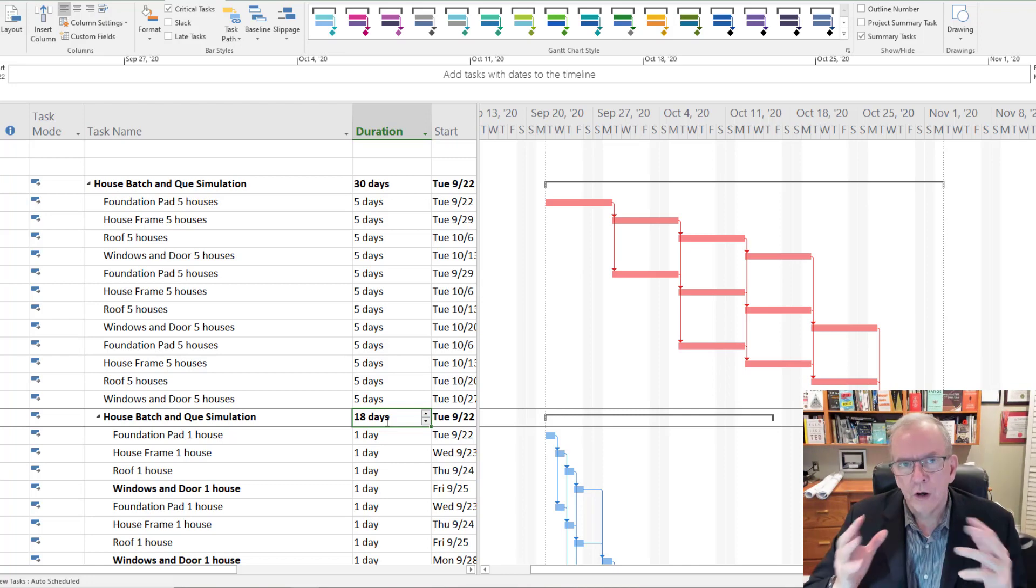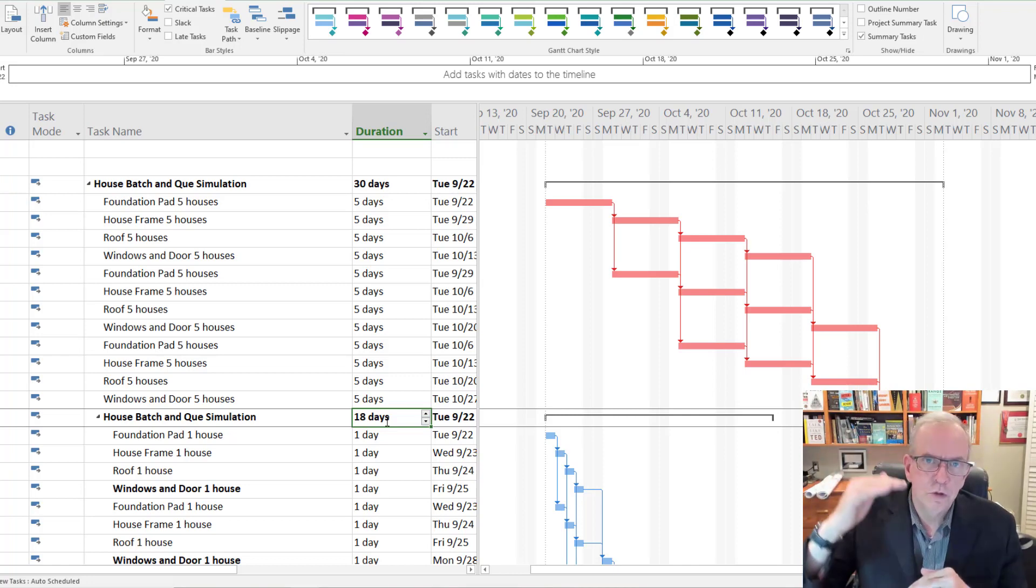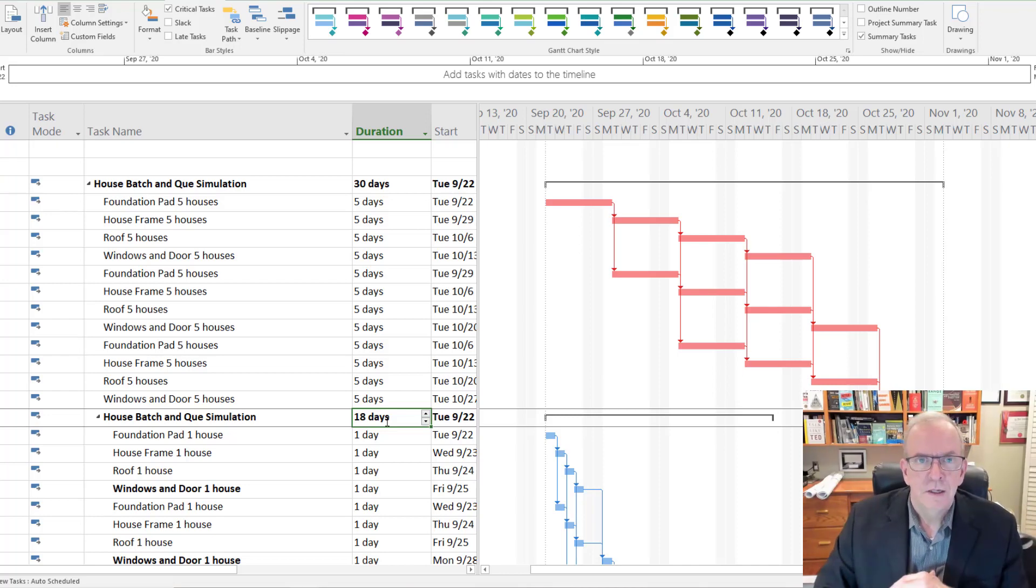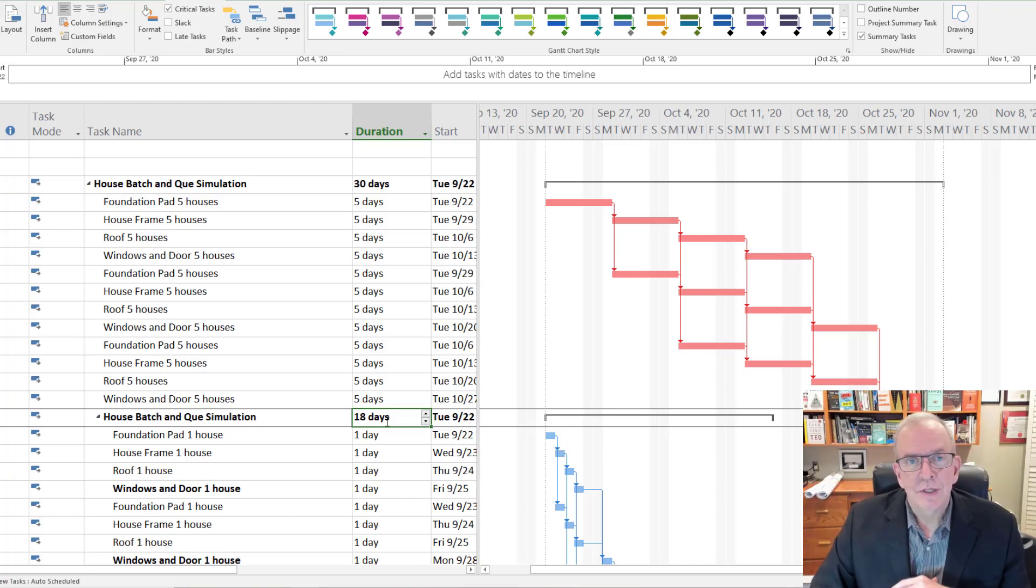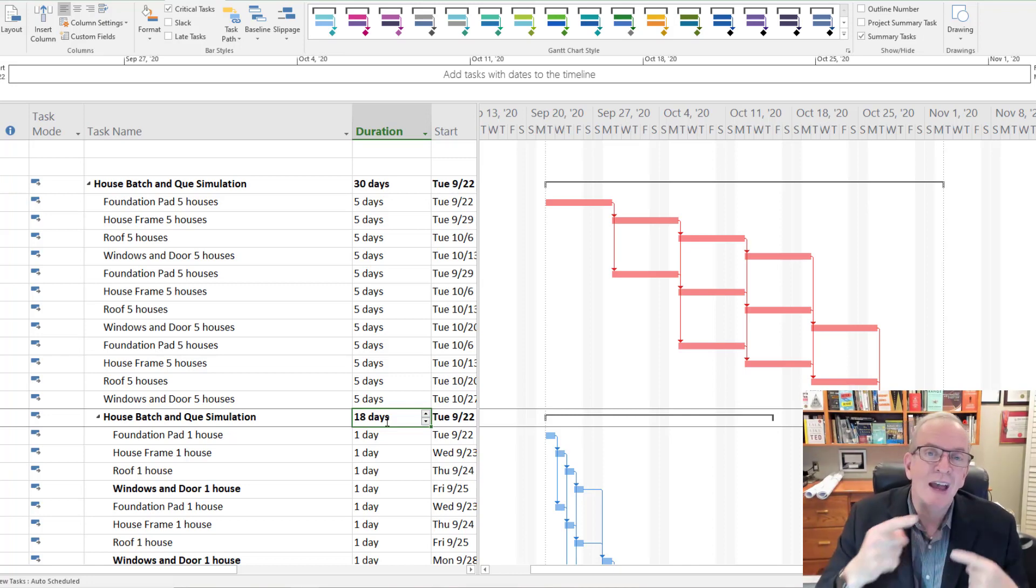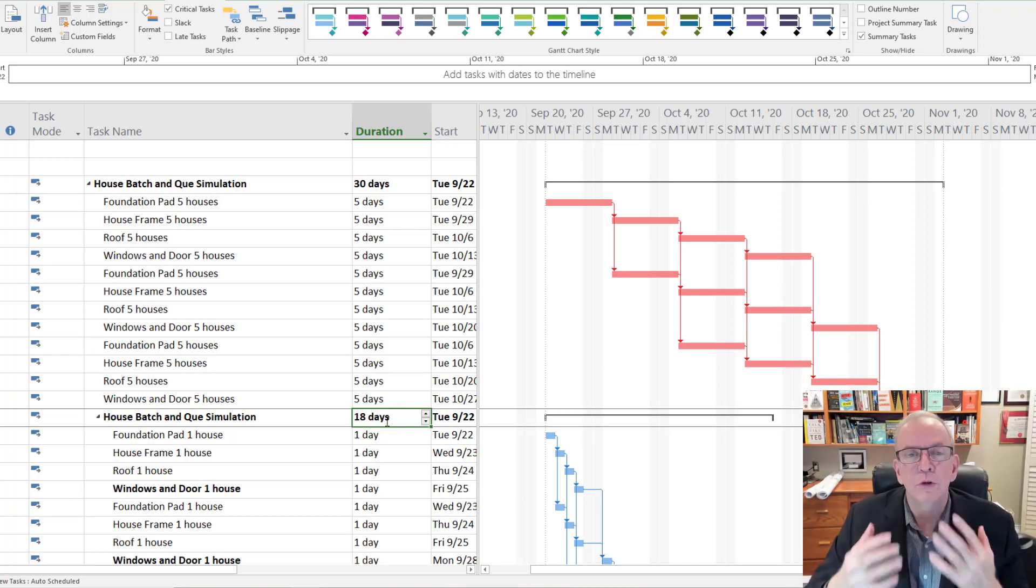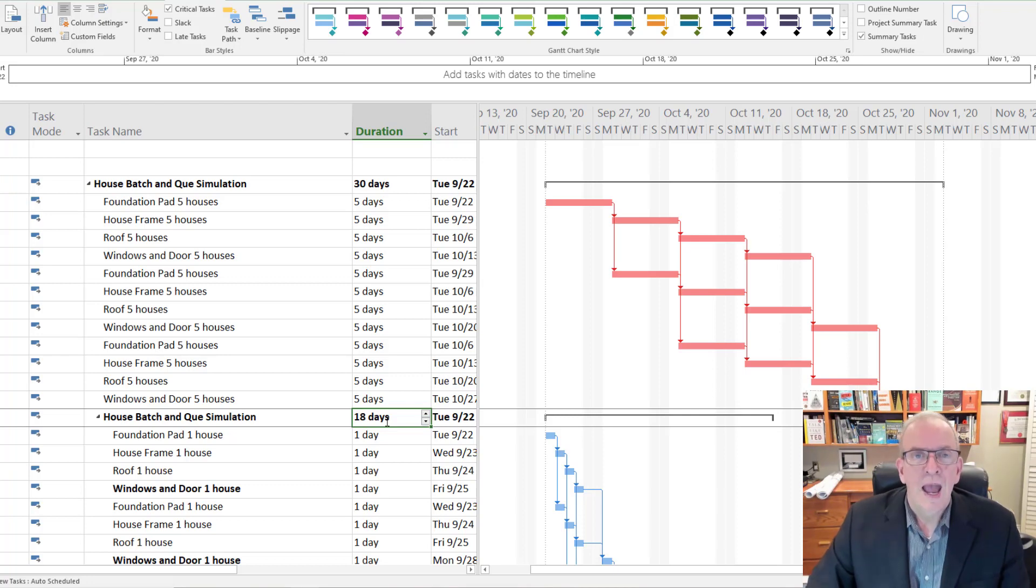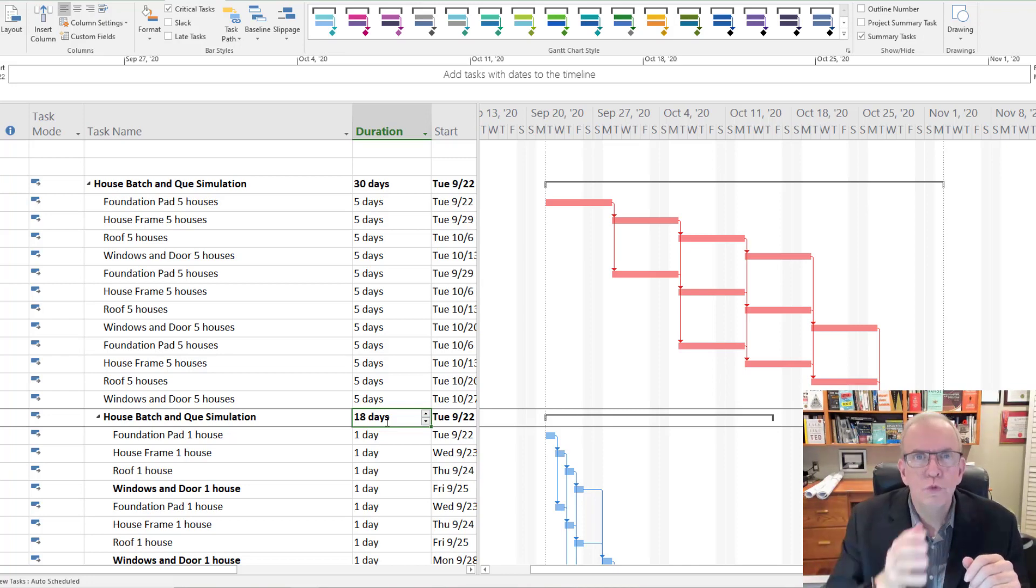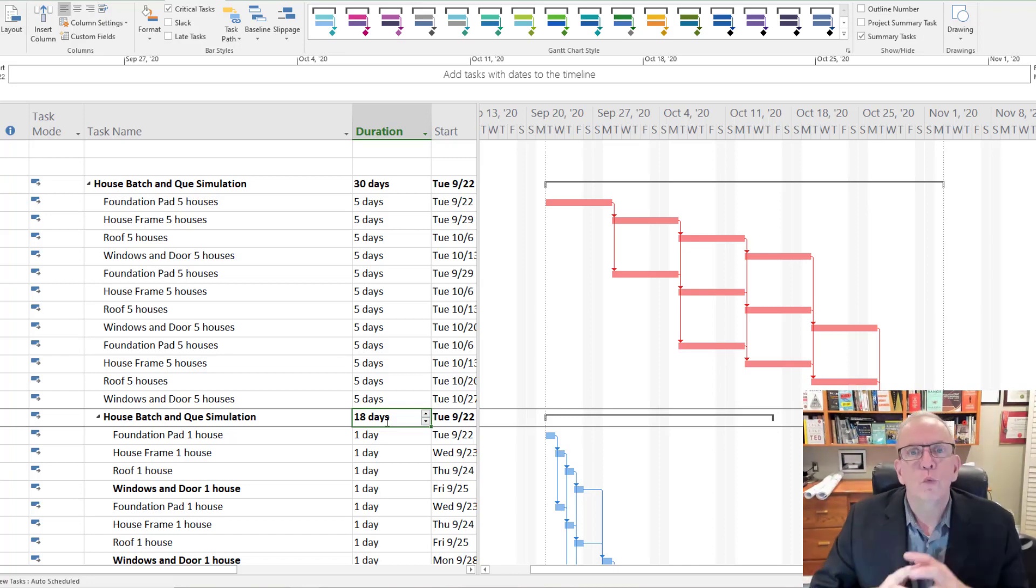Because if I'm a large home builder, or I'm a developer of multi-story buildings, if I'm able to get my buildings built in a shorter time frame, and get them occupied, like houses, I can reuse that money for more houses. If I'm able to build three houses in a two-year span, instead of two houses in a two-year span, my return on that investment money, my capital gain, to reuse that capital, my return on investment leaps up in very large numbers, large percentages. So there's a lot of advantages to thinking about improving the flow of work.